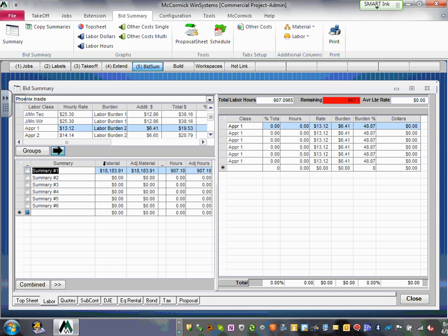Okay. Now Derek will say you lost it, Mr. Curry. I'm going to use apprentice. The apprentices, guys, 1 through 5, I believe they go through here. There you go, actually through 10. That's a 10-year or 10-level apprenticeship. So you can see the dollar value for apprentice 1 is $13 an hour. That's just kind of off school, has no clue what he's doing, or she. Okay, cool. Those are the guys. We're just going to go first. They're going to go for it.